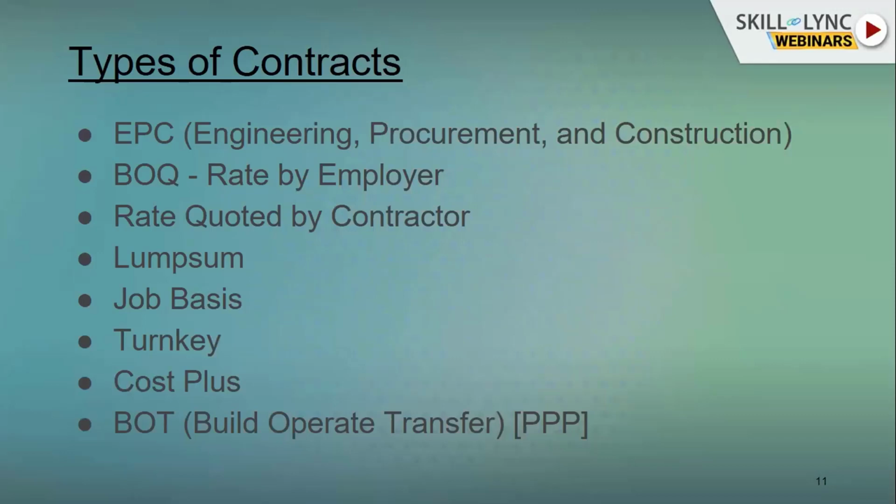Reliance will operate for a certain period, say around 20 to 30 years, depending on the target travelers and their unit rate. That period is designed by a third party, or for example Reliance, in such a way that they will earn some profit margin after the break-even point. So this is a joint call between the government and Reliance, MMRDA and Reliance, in such a way that they will maintain that property for 20 to 30 years, depending on the agreement.